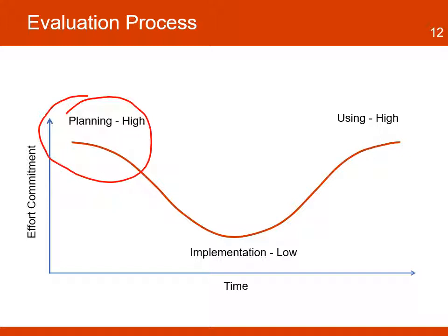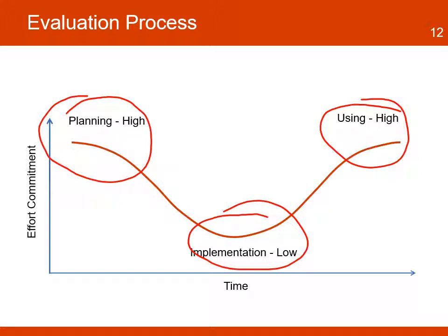The level of commitment is lower during the implementation phase since most of the work will be carried out by the consultant. The level is high again during the dissemination phase since it requires that the team spends time meeting with consultants, interpreting results, reviewing report drafts, communicating good or bad news, and identifying changes to improve the current or future projects.